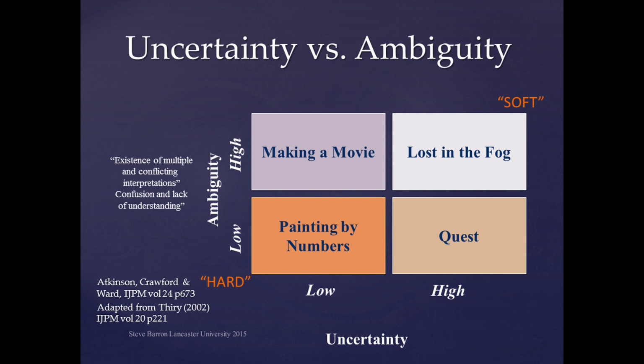Redefining the setting axis as uncertainty suggests that low uncertainty means we are familiar with the setting and have the expertise required to complete the project. High uncertainty means the opposite, that the project team does not have the knowledge and skills needed. Another way of looking at uncertainty is as a way to identify and acquire the data required. If we don't have the necessary data, then there is increased risk and uncertainty.